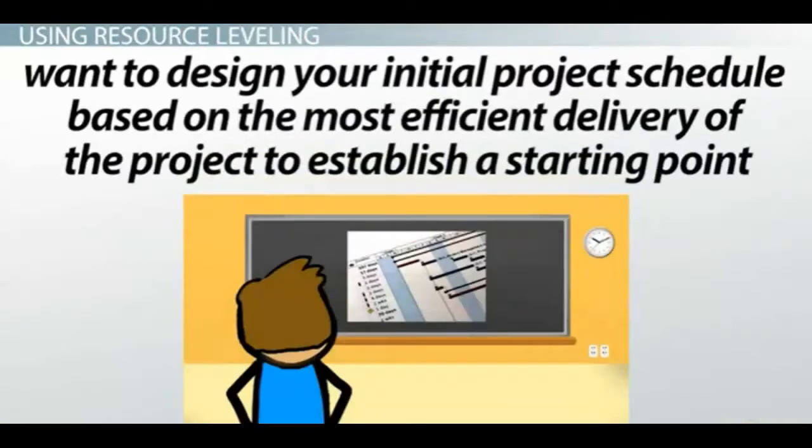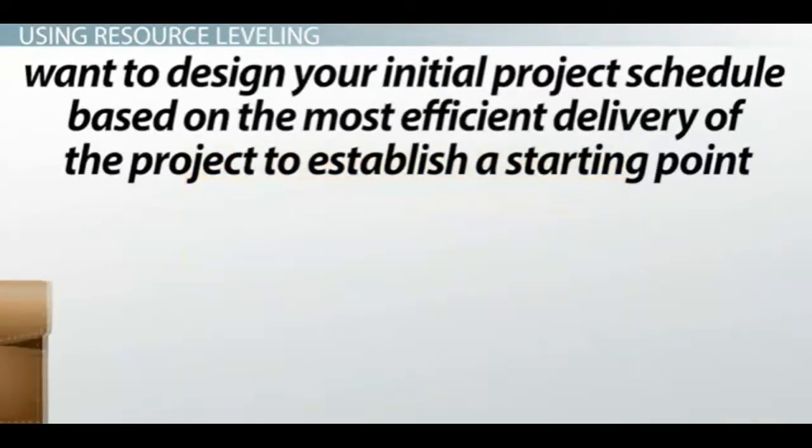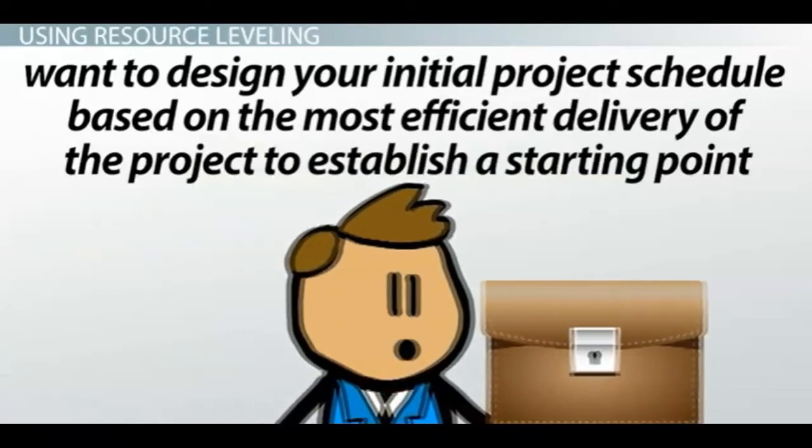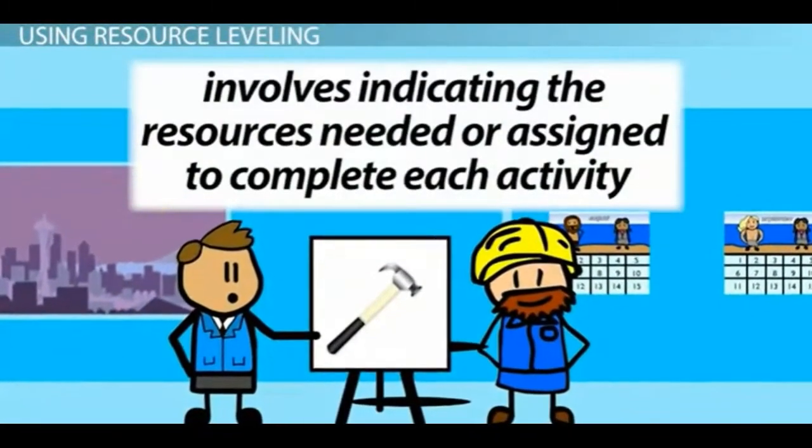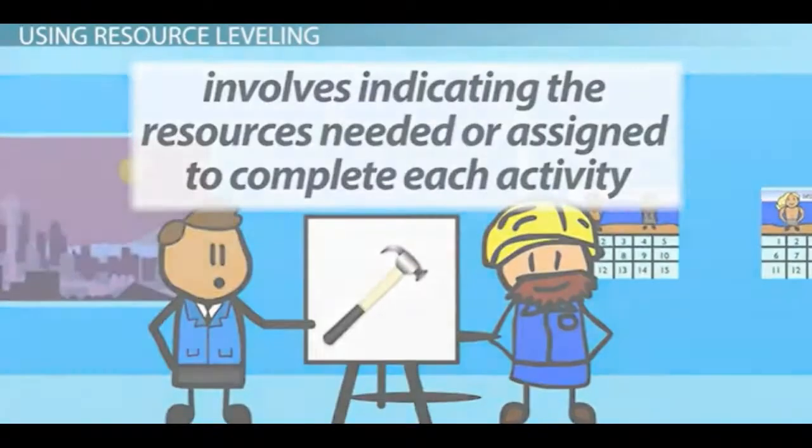You will want to design your initial project schedule based on the most efficient delivery of the project to establish a starting point. Loading the resources necessary to accomplish the project scheduled activities will give you your first look at the demand on specific project team members. Resource loading your project schedule involves indicating the resources needed or assigned to complete each activity.